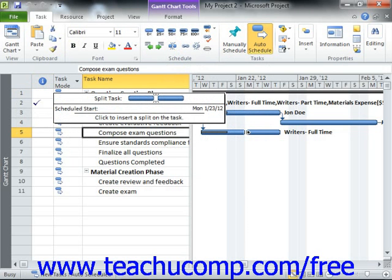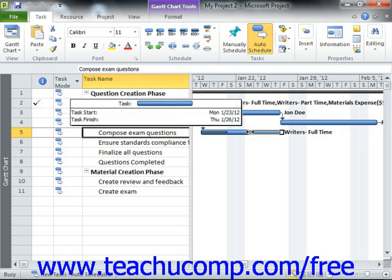Simply place this icon over the date at which you want to split the task in the bar chart part of the Gantt chart view, and then click and drag the task to the right in order to create a split. As you click and drag, you'll see a new start date shown in a small yellow text box called the Screen Tip. This tip helps you see the start date for the second segment of the split task. When the date shown in the Screen Tip is correct, simply release the mouse button.